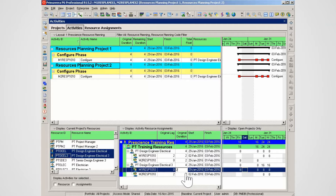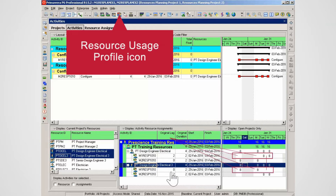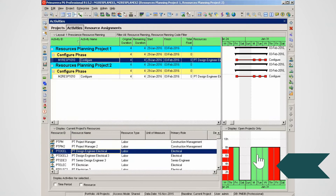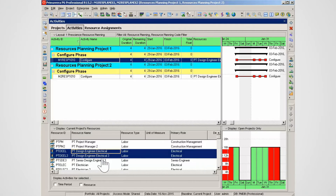To complete the pattern of work distribution, change the original duration on activity one to two days. Work for the two activities is distributed between the two resources with no over-allocation. This situation presumes that work can be completed with the reduced labor assignment. Select the resource usage profile icon from the main toolbar — no over-allocation for resource PT Deal or PT Deal 3. The total daily allocation for the two resources is now 16 hours a day — satisfactory allocation.